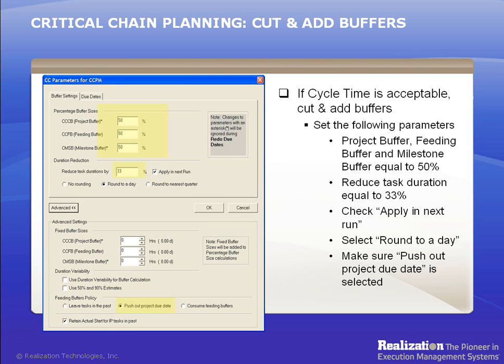Now, click on the Advanced button at the bottom of the screen and find the Feeding Buffer Policy. The default setting is Push Out Due Dates. This setting will give you the biggest feeding chain projection with a full, unconsumed feeding buffer. However, inserting a feeding buffer may cause slack on the critical chain, hence unnecessary increases in the project cycle time. The other way to go is to select Consume Feeding Buffers. When this option is set and Concerto is converting the project network to a critical chain network, if any slack caused by feeding buffer insertion is encountered, the slack will be artificially lessened by consuming the feeding buffers to close the gap.